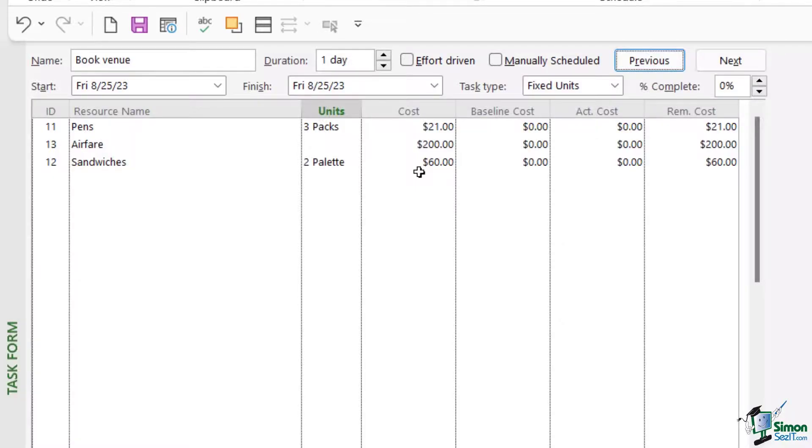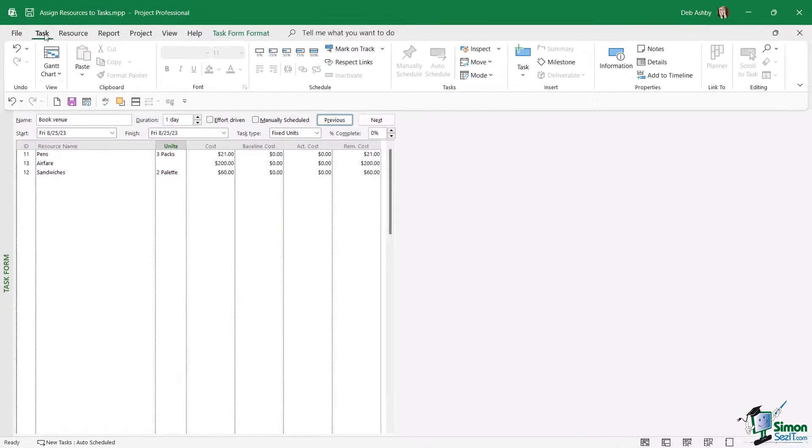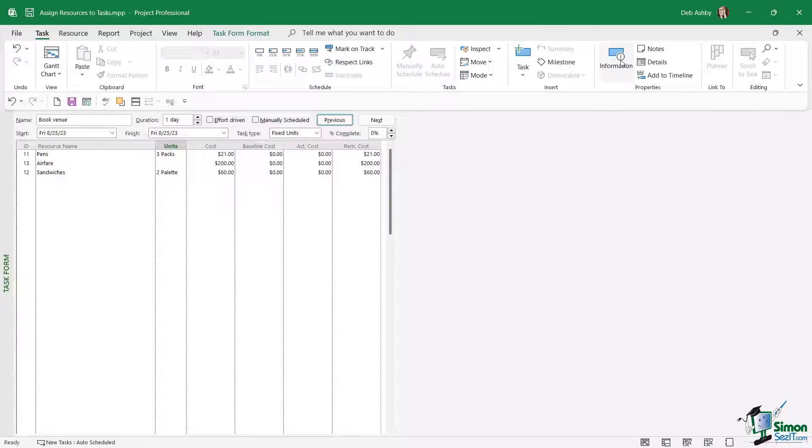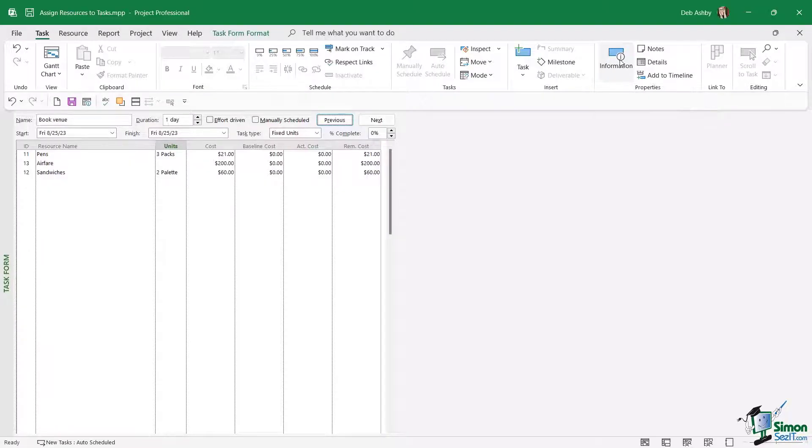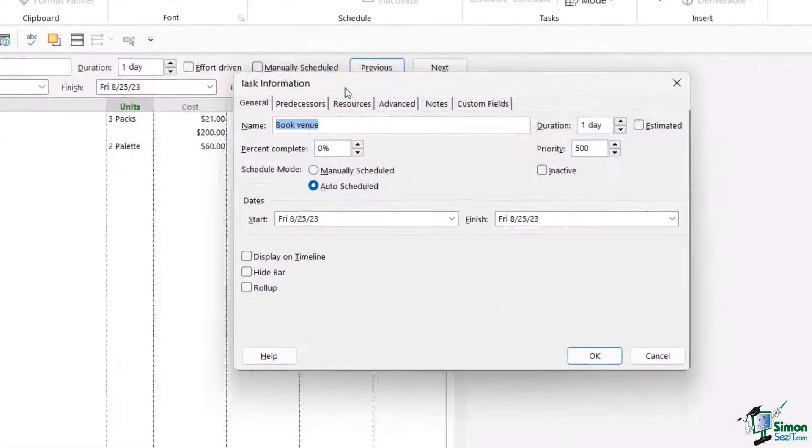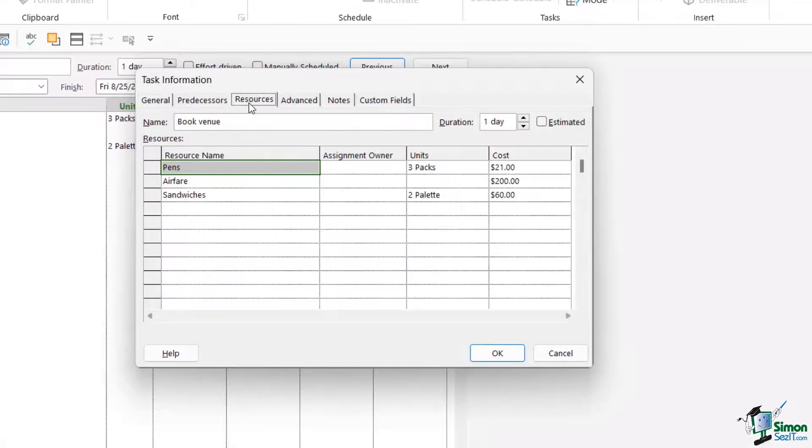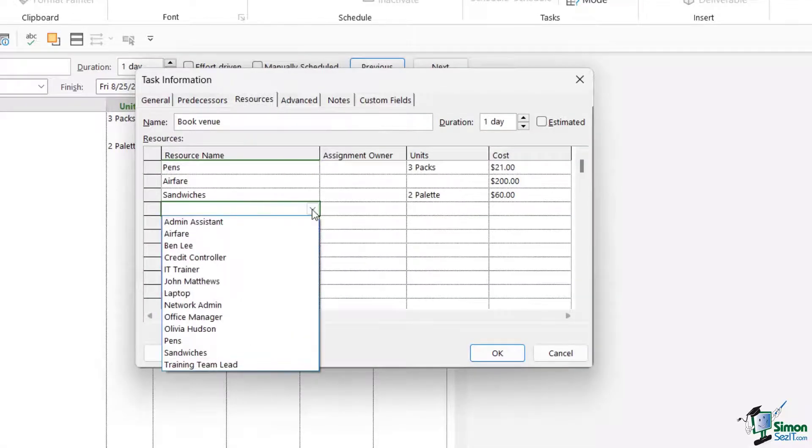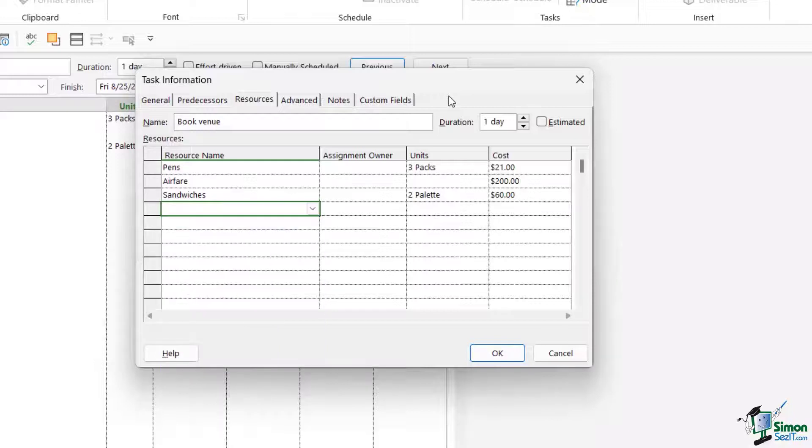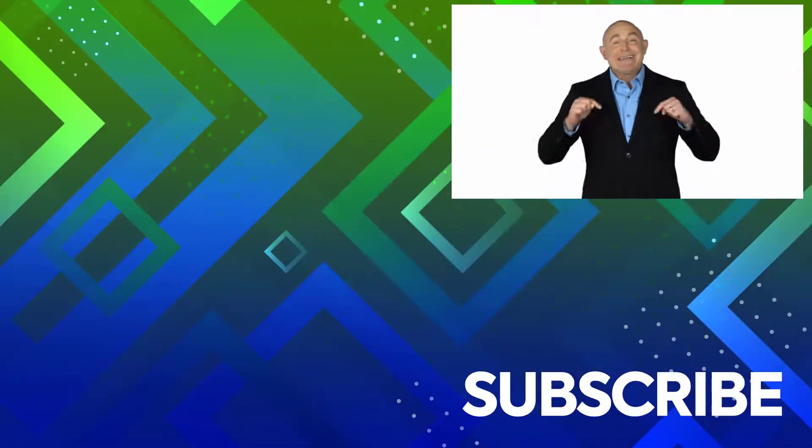Now the final way that we can add resources is via the task tab and the information button. So if we click on information and go to the resources tab, we can start adding in resources in here as well. So we just select them from the drop-down and enter in the units if required.